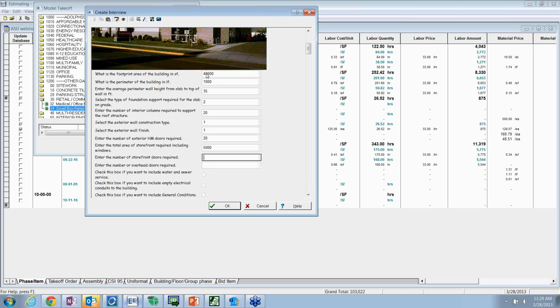So it kind of gives you that working drawing level of takeoff at a conceptual level. The beauty is, this is like a sheet of paper that I'm filling out. I can always come back and value engineer it, shrink the building, change the perimeter, go with a different system, boom, new number, and then at that point I can run a variance report showing everybody the changes that I've made from budget 1 to budget 2 or DD to CD.